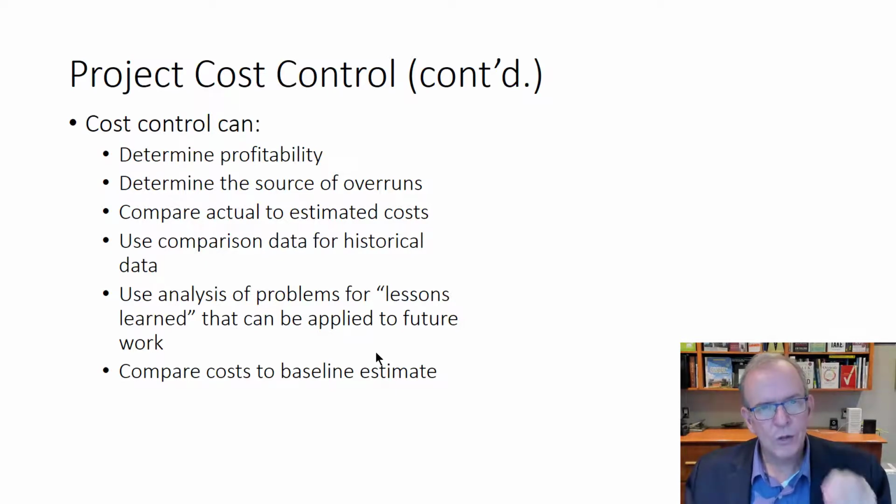If we can't get granular with the costs, then we don't know where we're losing money exactly, and that's a problem, right? So you want to have a system that you can get granular with, not go crazy granular, but so that you know this area of work, this is where we lost X amount of dollars. Not just we lost $200,000 on this project. You'd want to know, yeah, we did lose 200,000 on this project, but we lost 10,000 here, 20,000 there, 15,000 there, 40,000 there, 2,000, 1,000, 3,000 there. And then you'd be looking at Pareto's law.